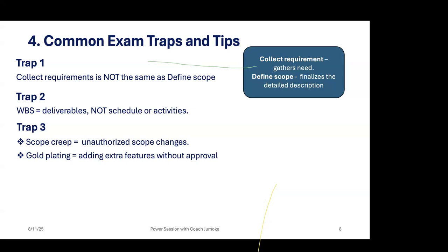Network diagram will be updated. Resource requirements will be updated, as well as the calendar, and the requirement traceability matrix will be updated. Risk will be updated. Budget will be updated because it has been accepted. So it's not a creep. It has not crept on the project. So authorized scope changes will go through the change control board.